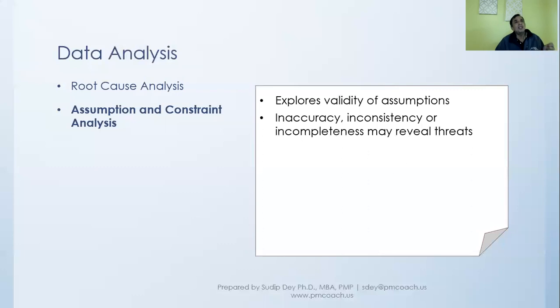For example, in your cost estimate you have made some estimate, and you have scheduled and made an estimate, and based on the rate of the resources and all that, it really doesn't tell you. So there is an inconsistency between the cost estimate and the schedule estimate, and there is some risk that you can directly see.